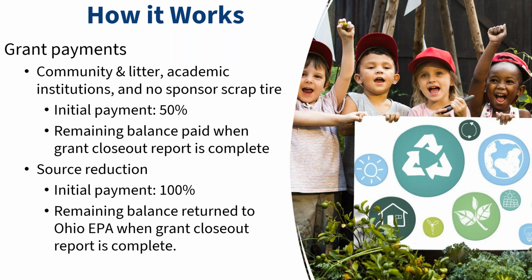The cooperating enterprise, which is the business, makes the purchase upfront. Once the project is complete, it reports the expenditures in the closeout final report, electronic documentation, and if no compliance issues are found, the funds are released. This grant requires 100% match from the cooperating enterprise, again, the business, and has a 24-month period for project completion.